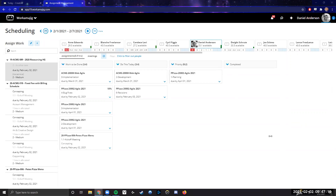On whether hours here match the staff schedule exactly: they should in most scenarios, since it's pulling the same detail the same way. If there is a difference, you may want to send that to your account manager. The only time they wouldn't match is if you've manually allocated hours on the staff schedule. The system looks at the total hours allocated for a task and spreads them evenly over the duration of that task, and then adjusts for actuals.